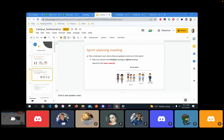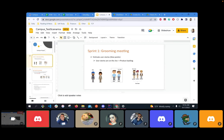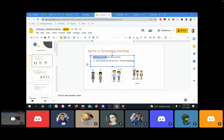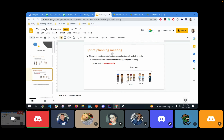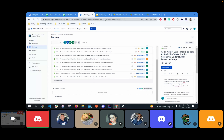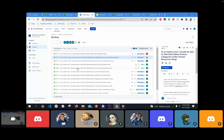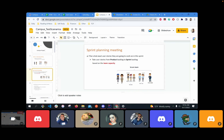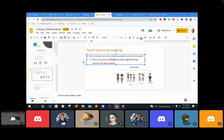Let's move on to sprint planning. We've done the grooming meeting — that's when we give points to items in the product backlog. In sprint planning, you move those stories from the product backlog to the sprint backlog, then you can start your job. You create team capacity and user story points that you can finish in your sprint — your sprint is two weeks, ten days.